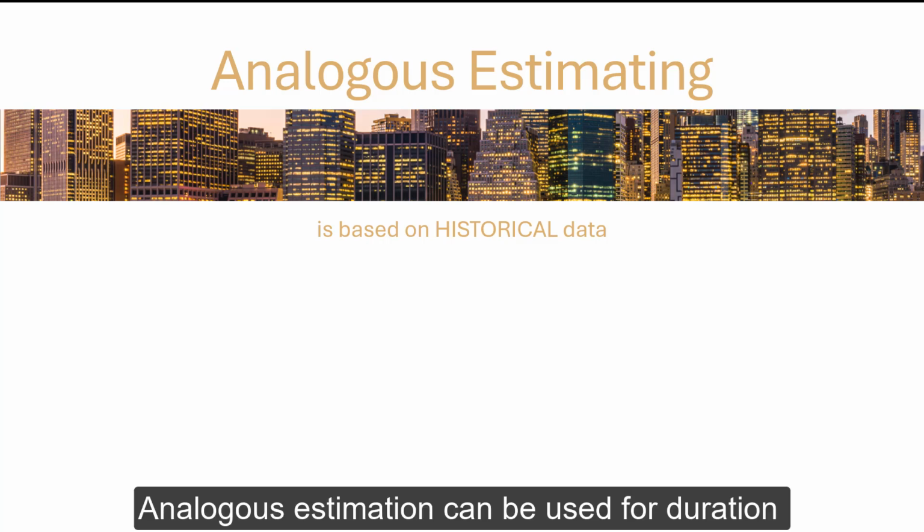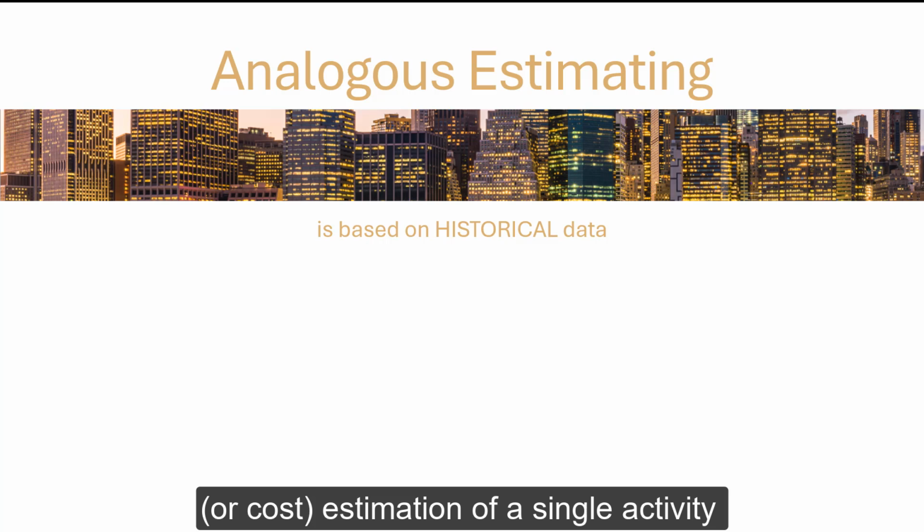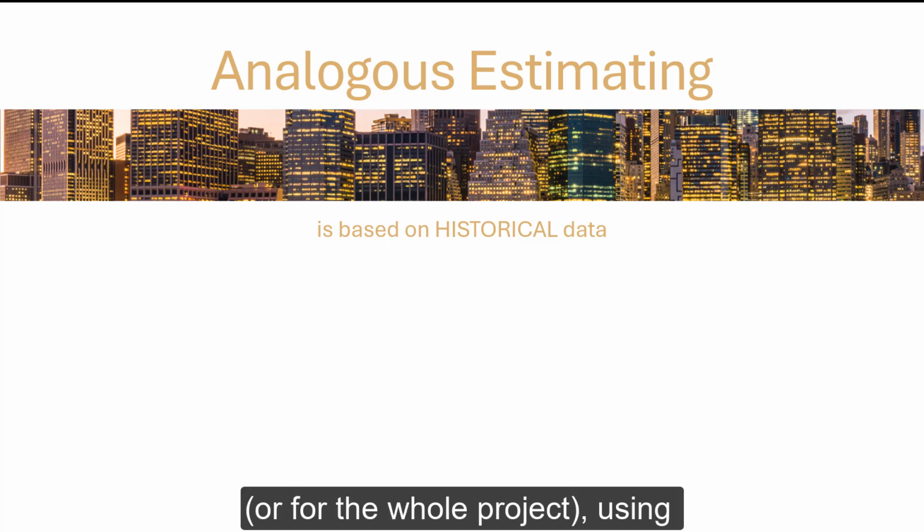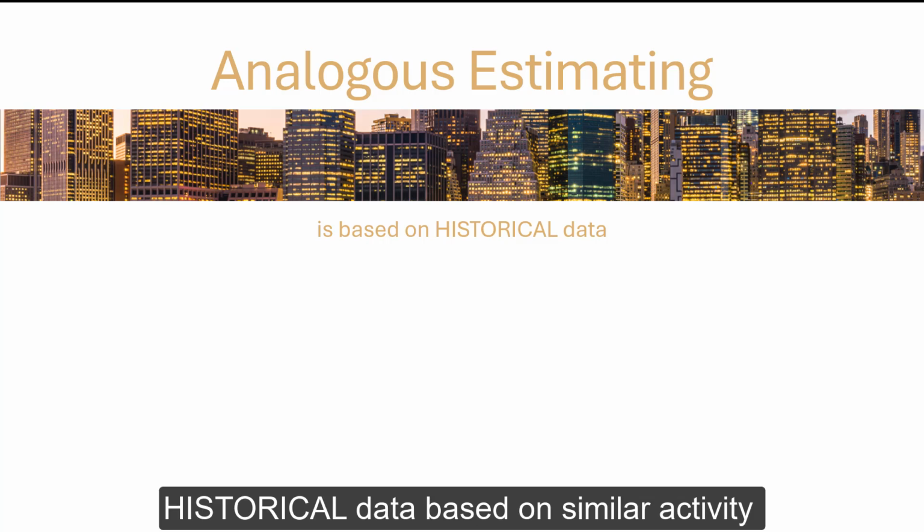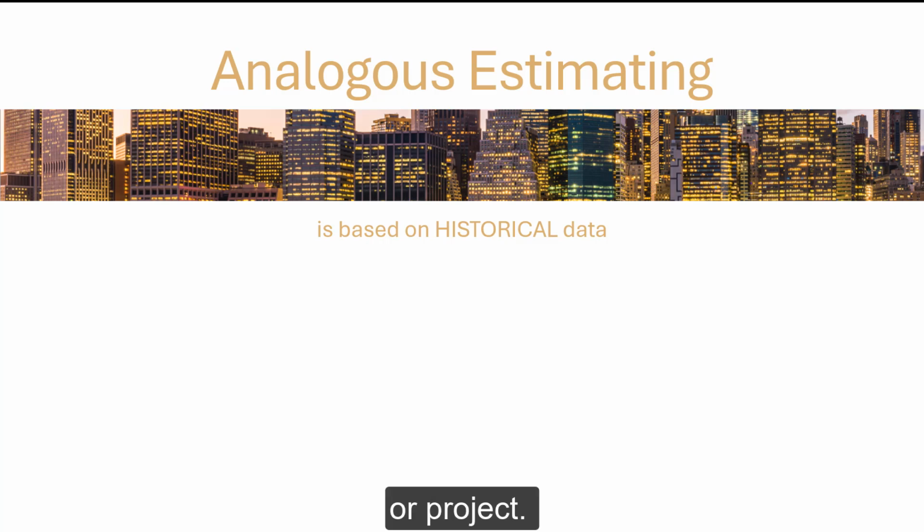Analogous estimation can be used for duration or cost estimation of a single activity or for the whole project using historical data based on similar activity or project.